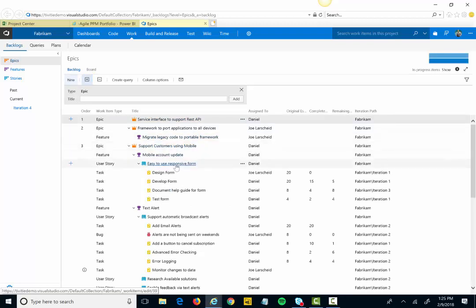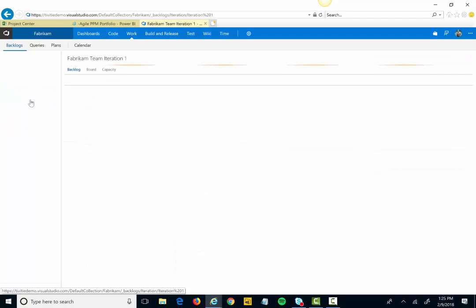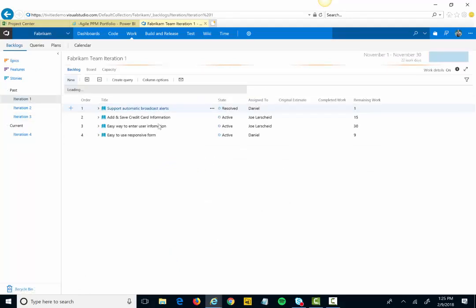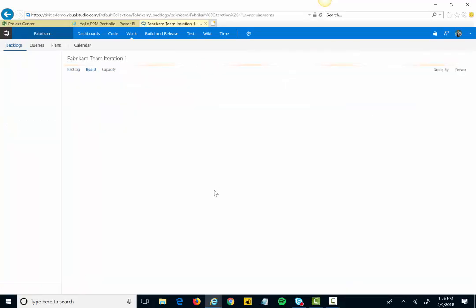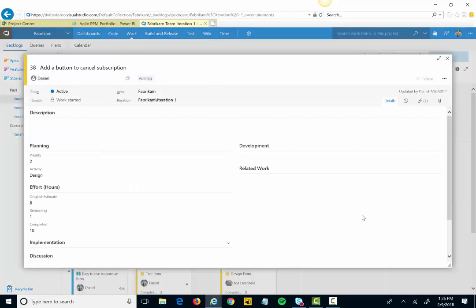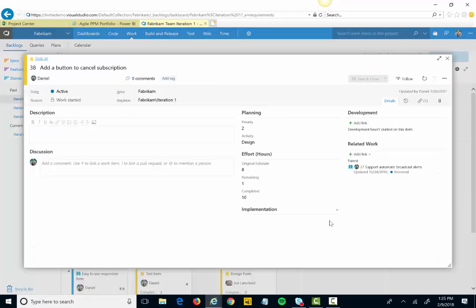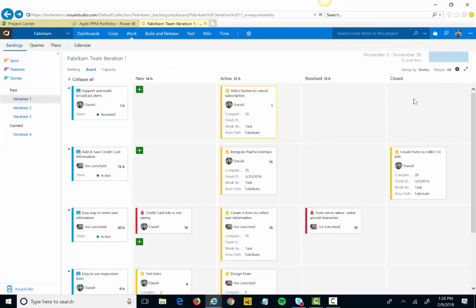I can then drag and drop those items into sprints or iterations, and then assign those out to people as well as utilize my Kanban board to update status by dragging and dropping from one status to the next. I can even put in estimates of effort, either in hours or points or both, as well as the actual amount of effort or hours I've spent on these items, timesheet hours if you want to call it that.